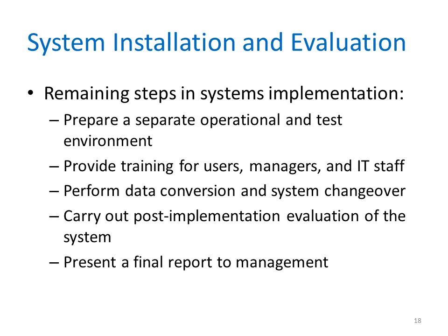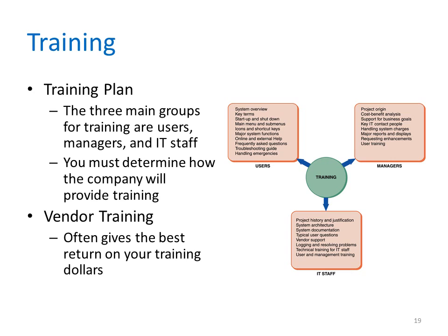Now you will carry out the remaining steps in system implementation. These are to prepare a separate operational and test environment, provide training for users, managers, and IT staff, perform data conversion and system changeover, carry out a post-implementation evaluation of the system, and present a final report to management.